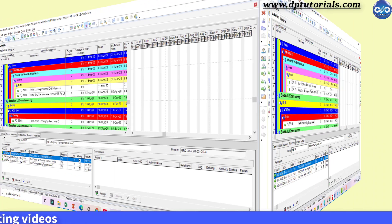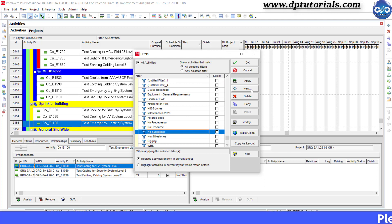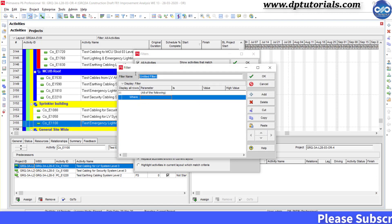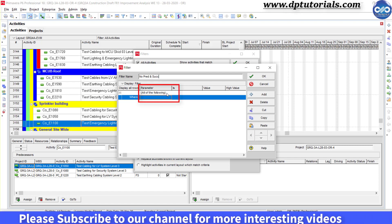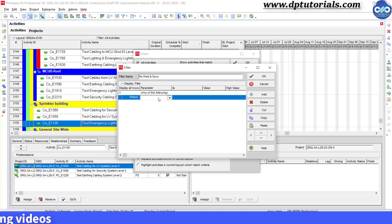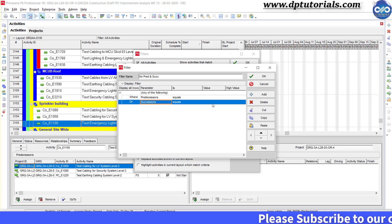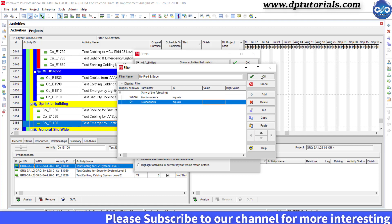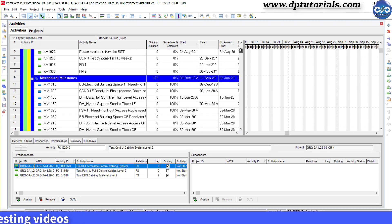Now finally, let us filter activities without predecessor or successor together in Primavera P6. Click on the filter icon, click on New, and name the filter as 'No Pred and Succ.' Now give the filter criteria: select 'Any of the Following,' and under Parameter, select Predecessor, condition as Equals, and leave the value as blank. Now click Add again and give the second condition as Successor Equals blank. We are giving the two conditions together. Click OK, and click OK again. Now you can see all those activities either without any predecessor or successor.